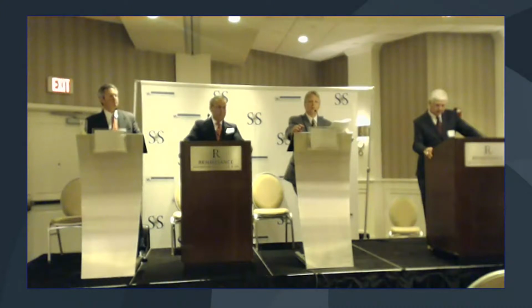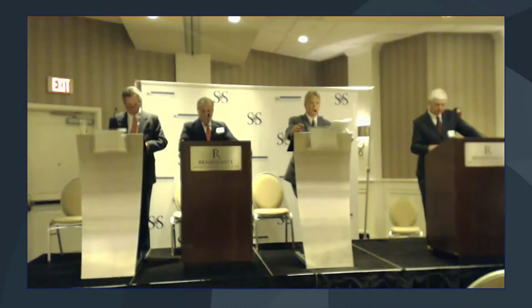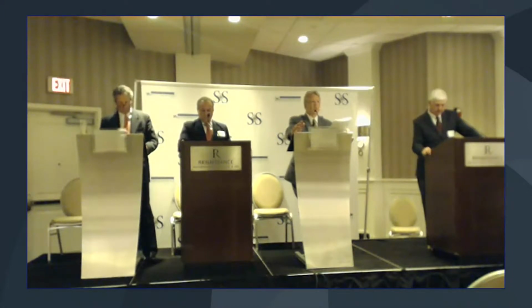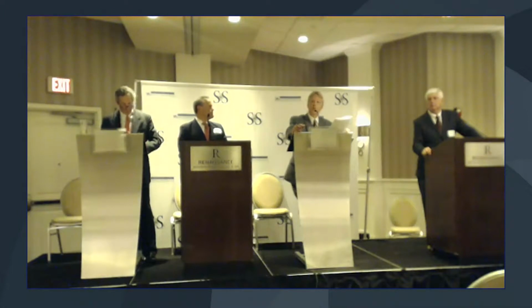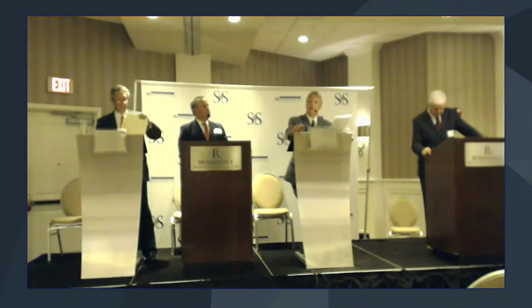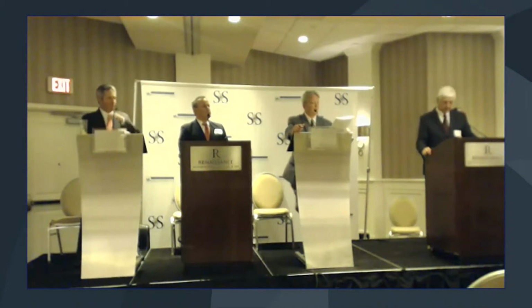It is not suitable for public projects generally because of the bonding requirements of public projects, and because, for reasons which I'll hit on in a moment, SDI, subcontractor default insurance, is not a suitable substitute for bonds, and therefore it does not have much play in the public arena. That could change. 25 years ago, I remember there was no design-build or construction management risk on public projects in Mass or Rhode Island, and now all that's changed. So things do change, and that may change.